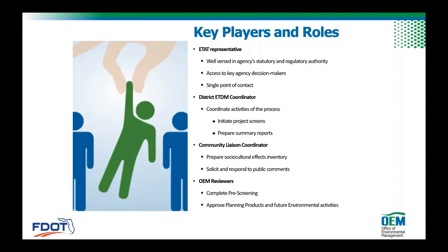They're kind of the conduit between us and their agency, and we use them all the time that way. There are also a few other folks that are key players and roles. The district ETDM coordinator in Turnpike, that's Rax. He is the administrator over the projects within the Turnpike. So he's the one making sure that the project is uploaded, the purpose and need is there, that the line work looks good, that the preliminary environmental discussions are there. He's doing all of that initial work, and he's the one who officially sends the project out for review and starts off the 45 days to all the state and federal partners as well as the public.